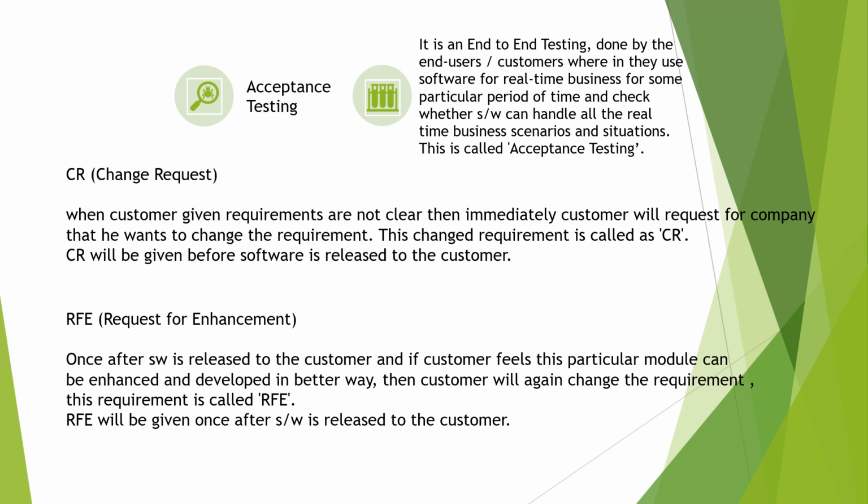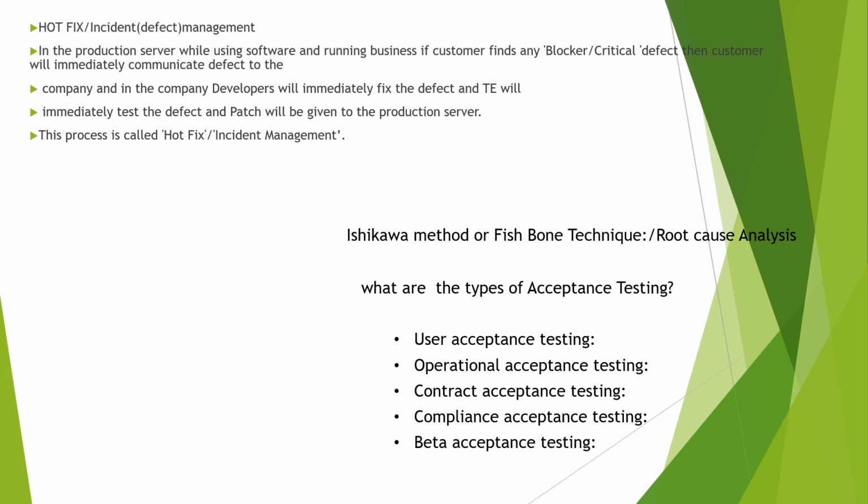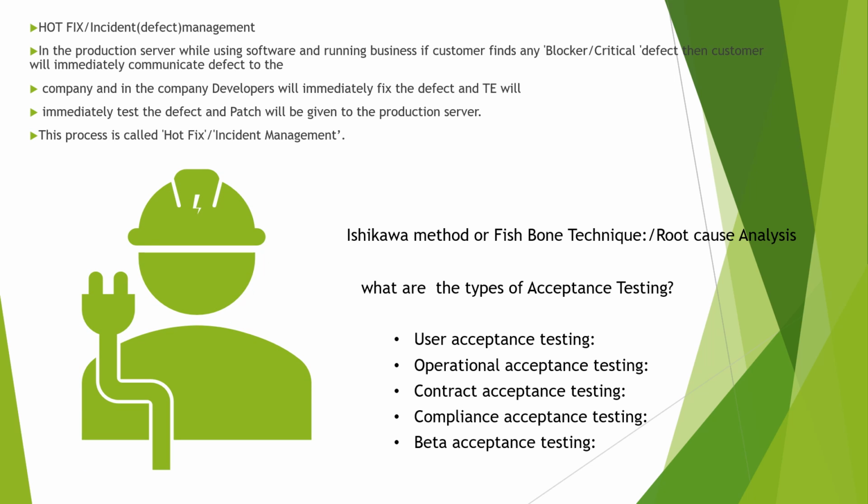After the software is released, if the customer wants to change the requirement, then we will call it a request for enhancement. For request for enhancement, we will charge the customer. Okay, next, there is an important thing called hot fix. It is one of the interview questions. What is hot fix? Let us know everything while taking the course.